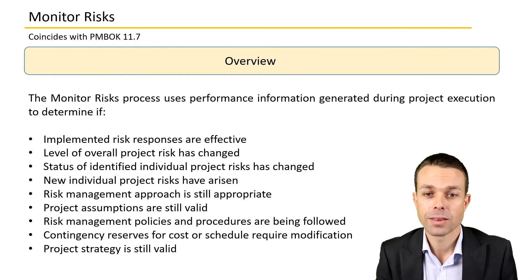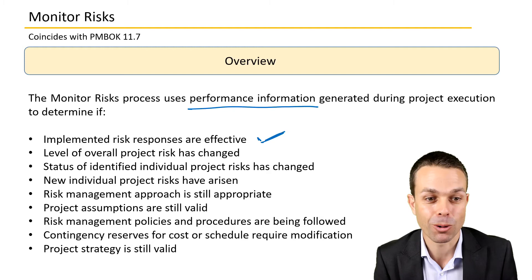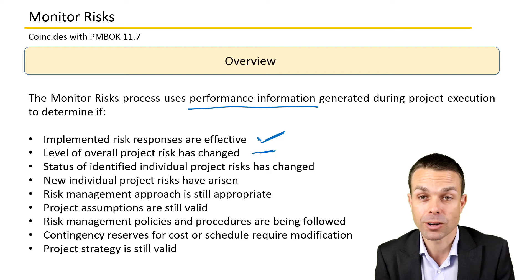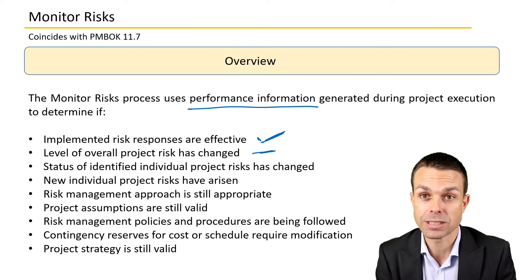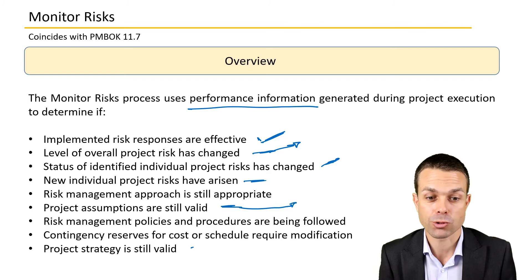Here's an overview of monitoring our risks. This process uses performance information generated during project execution to determine if implemented risk responses have been effective — are they doing what we wanted? The level of overall project risk — is it still within the risk threshold acceptable to our stakeholders? Has the overall level of risk changed? The status of identified individual project risks — has that changed? Any new additional risks? Have project assumptions changed or are they still valid? And is the project strategy still valid based on the risks that have happened?